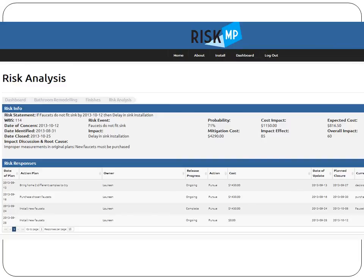Analysis of the risk happens in meetings. What are we going to do about it? What are the possibilities and what are the costs? We can compare the expected cost of the risk to the expected cost of the response plan, and see which responses will be effective and which ones will go ahead.